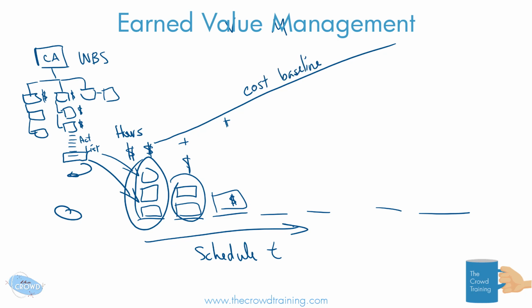And our cost baseline is time phased, so it's across the time, the length of the project until we determine that it is done. And then at this point throughout the project, we have this approved baseline that we're going to be using as a comparison so that we could find out, well, as our project is moving forward, are we ahead, are we behind, or not? So I'll erase that line for now.